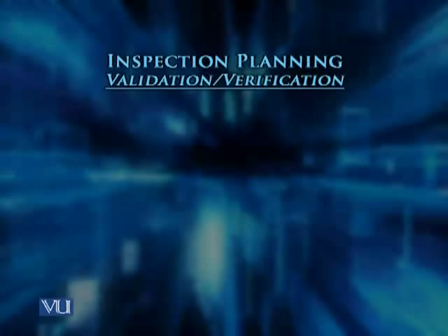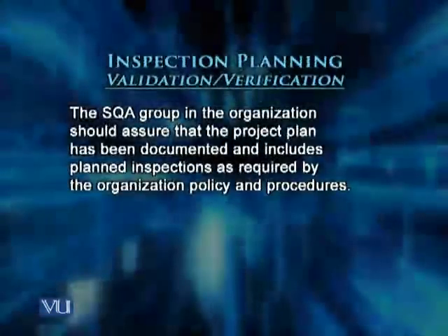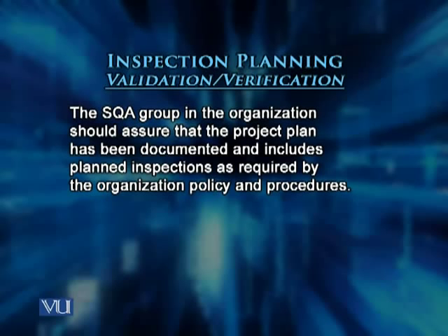With tasks, we have to verify and validate. So what are the validation or verification activities for inspection planning? The SQA group within the organization should assure that the project plan has been documented and includes the planned inspections as required by the organization policy and procedures. So it is the responsibility of the SQA group to audit the project plan to verify that yes, these activities have been included in the plan.